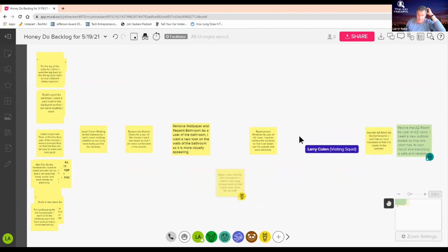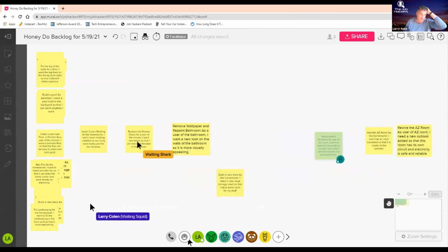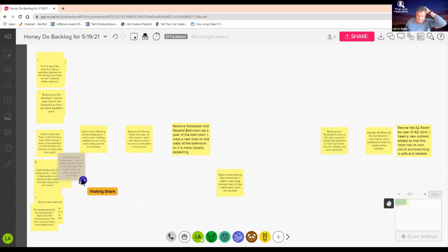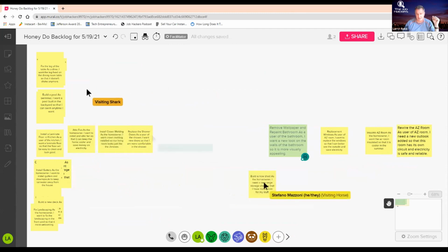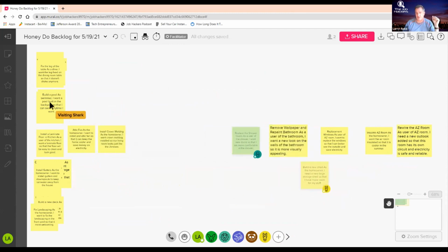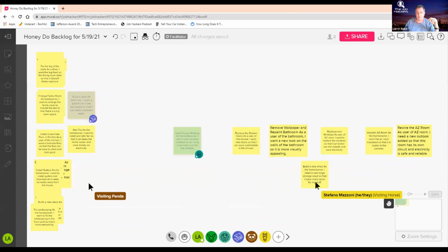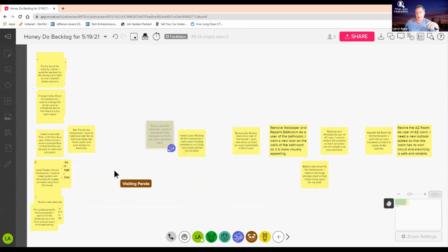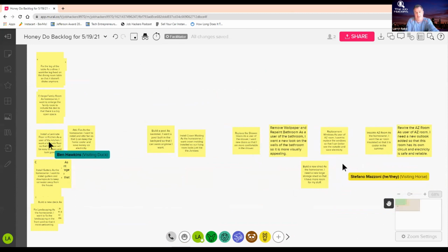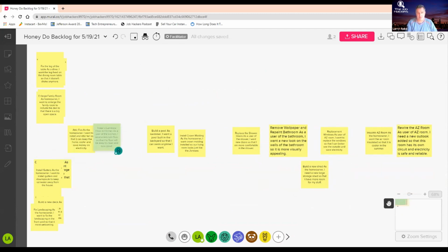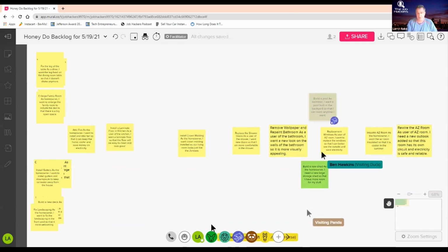Now move them in the order that you see. Some are going to be like others, some are not. You've got the whole board and then some to work on it. You already are moving it. You're getting it, right? You folks are seeing what's happening. I call this part, there was a name for it. I thought I invented it, but like all things, I didn't invent it. It existed before. It's called silent grouping and affinity estimation. This is the silent grouping part.